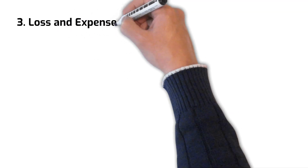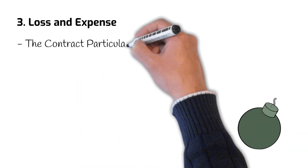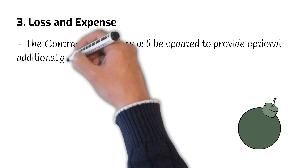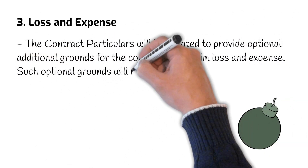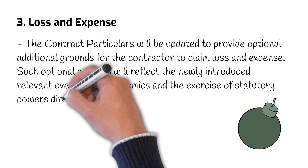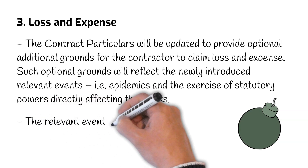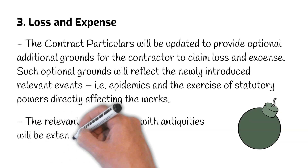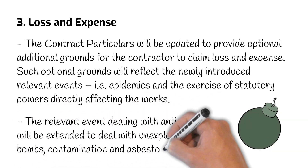Number 3: Loss and Expense. It has been reported that the contract particulars will be updated to provide optional additional grounds for the contractor to claim loss and expense. Such optional grounds will reflect the newly introduced relevant events, i.e. epidemics and the exercise of statutory powers directly affecting the work. It is also reported that the relevant event dealing with antiquities will be extended to deal with unexploded bombs, contamination, and asbestos.